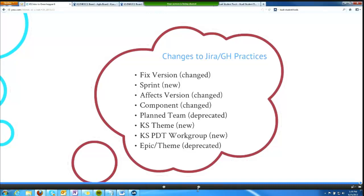Finally, epic theme was the way we used to associate tickets to epics, and we no longer do that. Tickets can now be drag-and-dropped right from a sprint or a backlog onto the epic in the epic panel on the left, and Greenhopper handles the rest.